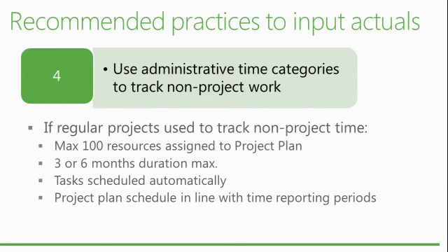The idea behind it was, you have a project that goes by phase, and you can define the first phase in a pretty good way, at the detail level, but you don't know what's going to happen after that. So you just put a bunch of things, and for some of them you have no clue. You put some notes. In the date field, you can say, talk to so-and-so to find out what's going on, or you can put TBD.